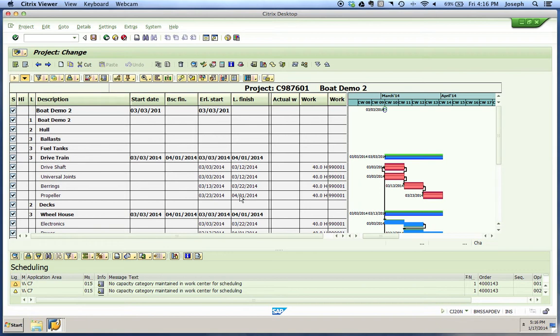Next, we'll move on to actual dates. This activity should specifically be revisited after you've completed the rest of the scheduling training — do not conduct this exercise on your project until other training lessons are completed. Your actual dates are set in the project execution phase, for example by entering actual dates for WBS elements in the project planning board, or by confirmation of network activities via transaction code CN25. Actual dates are also entered manually via CATS. The date of the first CATS entry on an activity becomes the early scheduled basic start date of that task.